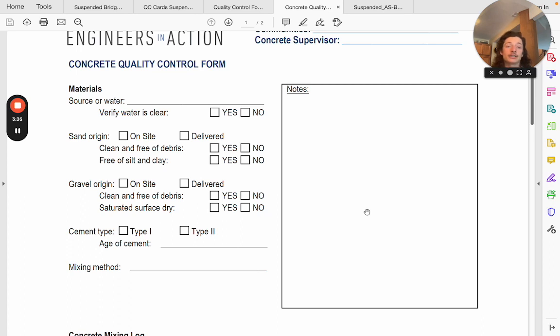Now, during construction, another useful tool for the QC manager that is often underused is the daily updates. The construction manager is required to provide these daily updates via WhatsApp every day. And these are all in the bridge binder for you to review. But first, what did you do today? Second, what are you doing tomorrow? Third, what potential roadblocks are you facing? Fourth, do you need to request any toolkits? And fifth, send any photos or links to incidents or near hit reports.